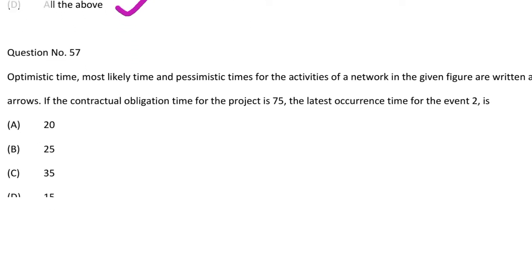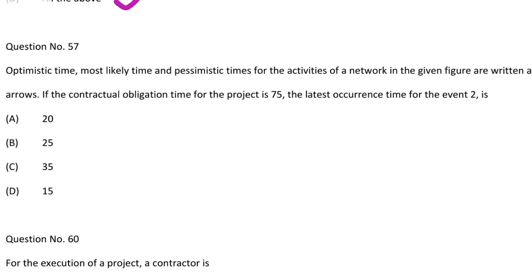Next question: optimistic, most likely time, and pessimistic for the activities of the network in the given figure are written above the arrows. If the contractual obligation time for the project is 75, the latest occurrence time for event 2 is — option A 20, option B 25, option C 35, option D 15. The correct answer is option B, 25.